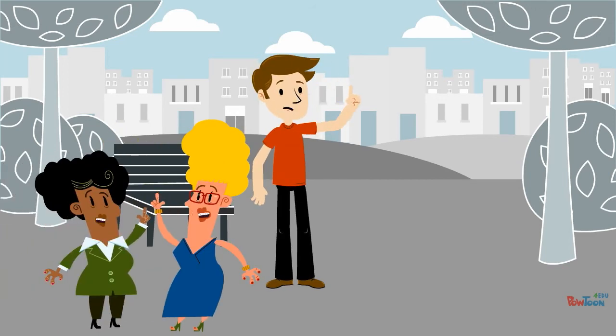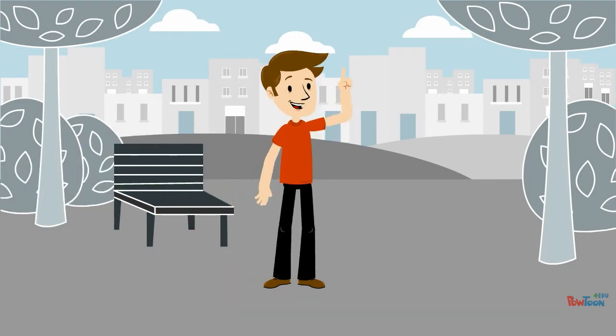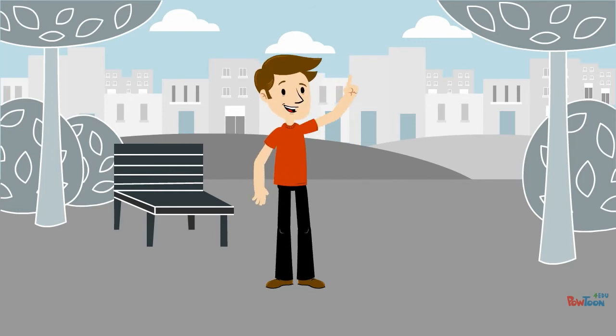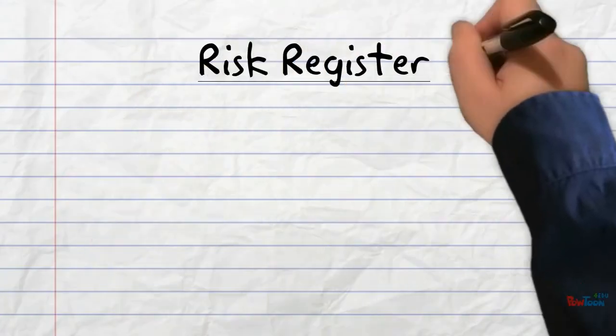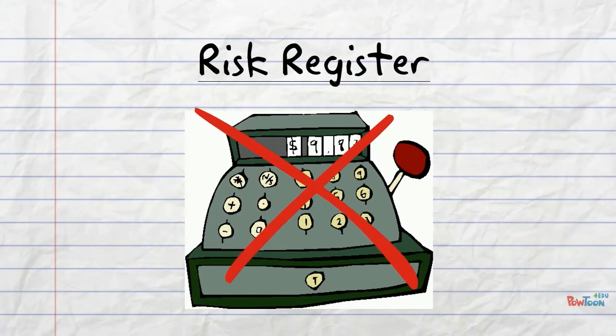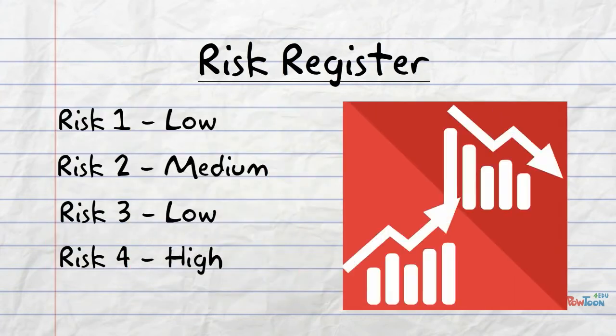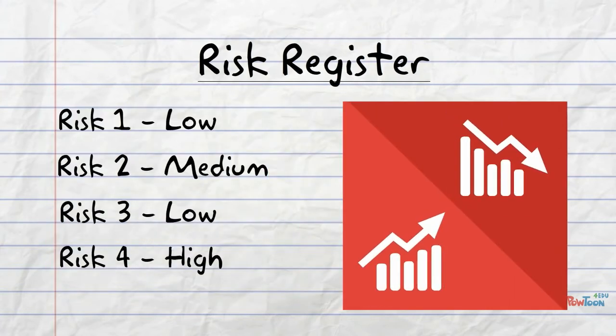Another method you might use is called interviewing. This is as simple as it sounds. You talk to people that have had a similar project and ask them to identify any problems they had or what went right. Once you've identified the project risks, you need to prioritize them, and you can do this using a risk register. Again, no. A register is used to document all the risks you've identified in a spreadsheet. This tool is useful to list out all the risks in one area and prioritize them according to likelihood and severity.